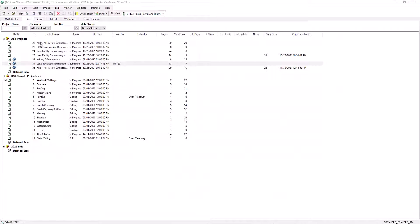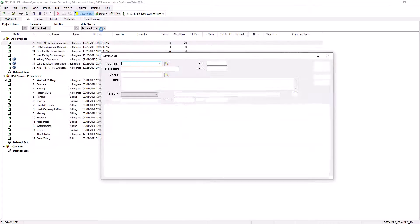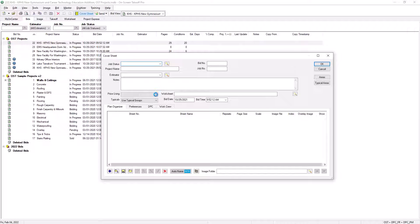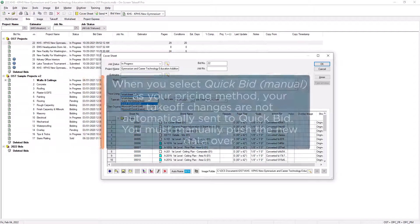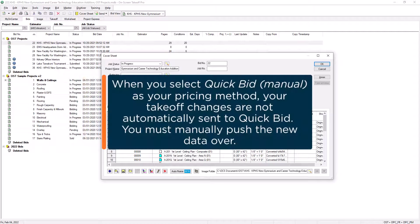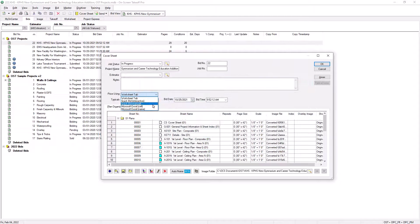The other option is QuickBid Manual. If you select this option, then any changes you make are not automatically applied to QuickBid. You must manually push them over every time you make a change by pressing the F9 key. This is sometimes recommended for clients whose databases are stored on a network or server location to minimize latency.